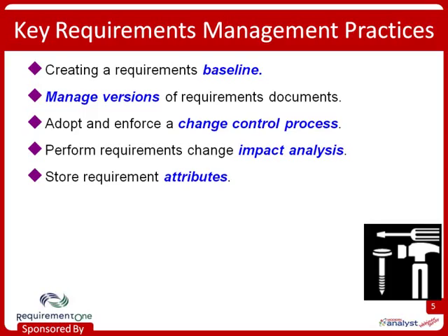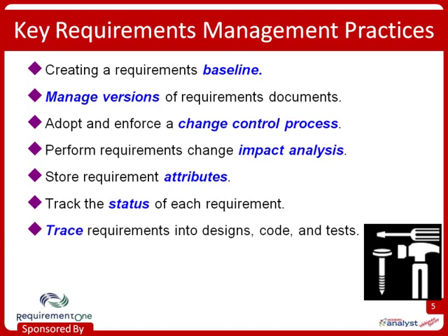We might decide to store, in addition to statements of individual requirements, some attributes that give us a richer understanding of each of the requirements that we're dealing with. One of those attributes might be status, so that we can track the status of each requirement as it migrates from conception, an idea in someone's head, clear up to the point that it's fully implemented and verified in a piece of working software.